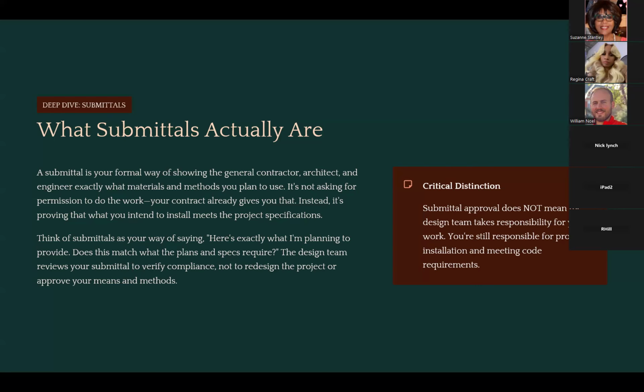I have a digital stamp that I use that just has a little disclaimer on it, and then it has a box where it says either approved, reviewed, or rejected, and you can check which one it is. So yes, putting your own letterhead or your cover sheet, your transmittal, on the front saying I have reviewed this is a good process to do before you send it on up to the next level, your prime contractor, your general contractor.